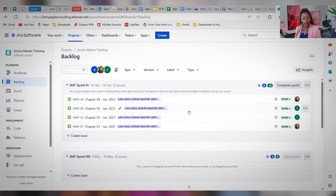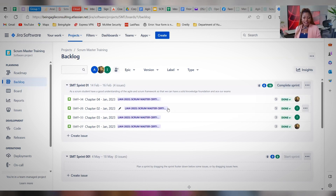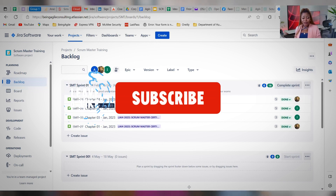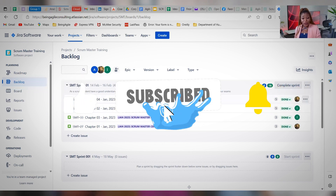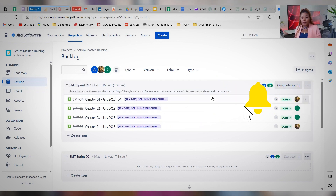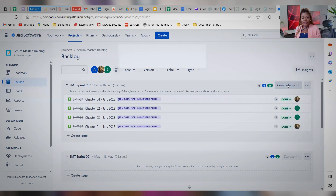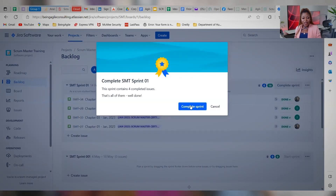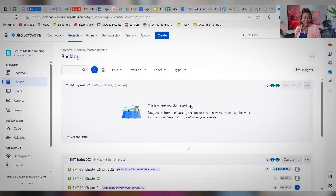From here you can do whatever you want to do. If you need to edit something, if you need to add whatever information, you do that. Once you're done, you can close the sprint again. Let's say you're trying to add one more story — whatever you're trying to do. Once that is done, all you have to do is come to the place that says Complete Sprint, click on it, and you complete the sprint again. And it's closed back.